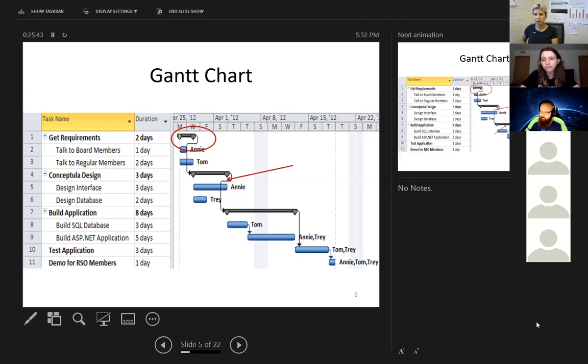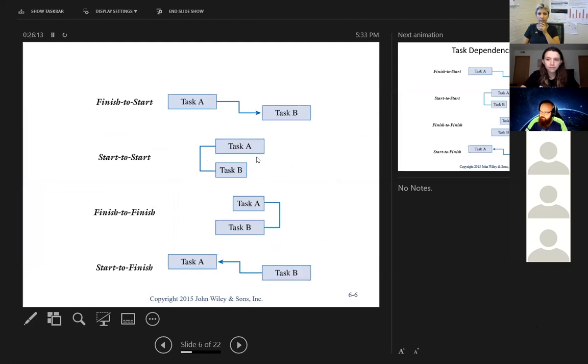Your people are busy, your bandwidth is busy, your servers are busy doing other transactions, your software licenses are being used, you have a limited number of licenses, or your facility is busy, like you have a number of people in this room working on a piece of the project, and the other people don't have the facility to work on. So outcome dependency versus resource dependency, the two types of dependencies that I want you to ponder when we come back to these ideas on Wednesday.